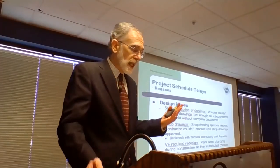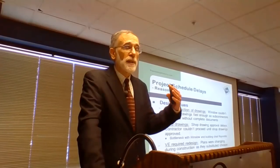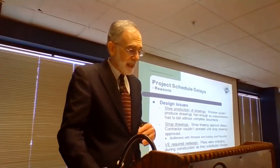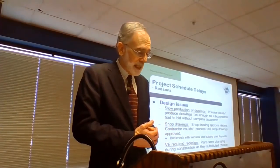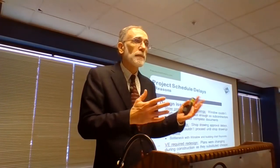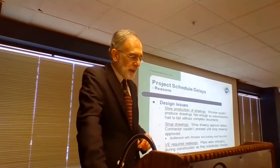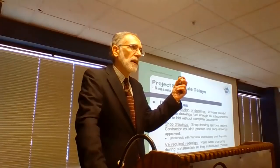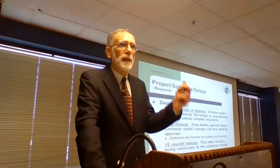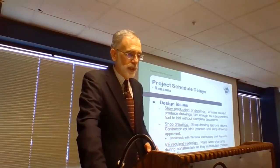So there are other design issues that come up. One is that there was a slow production of the design drawings, so he couldn't produce these fast enough. Winslow couldn't, the White House architect. He had a small staff. The shop drawing approval process was delayed because there was a bottleneck between Winslow and the public buildings superintendent. Every time they did value engineering, every time they decided to substitute a material or a process or a design, they had to redo the plans. So that takes additional time.